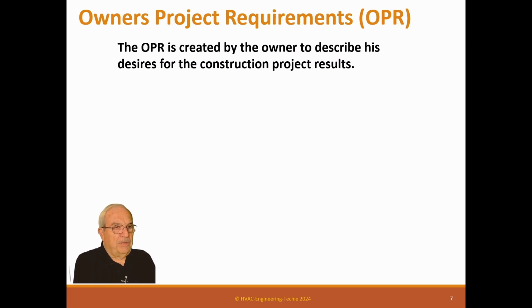But be truthful, you're going to have to help, because most owners don't know exactly what to put in the OPR. So what we normally do is we give them a questionnaire that actually asks all the questions of what should be in there. They can say yes, no, or give an answer. And then the OPR can be built from there.